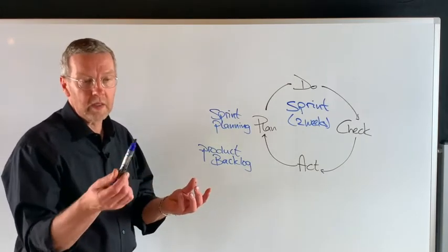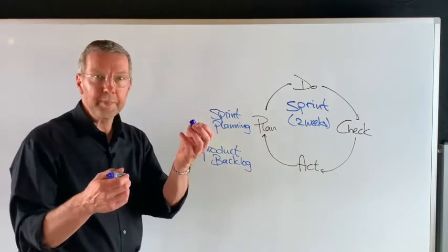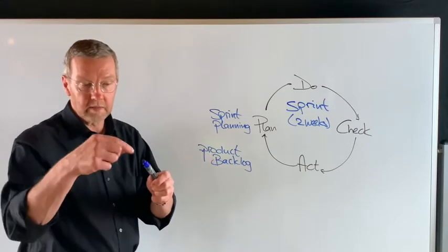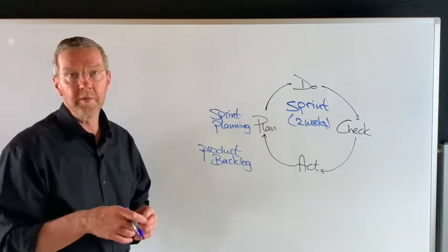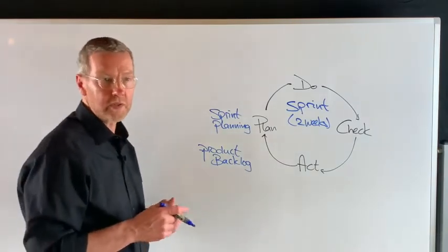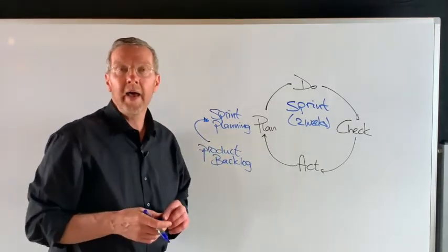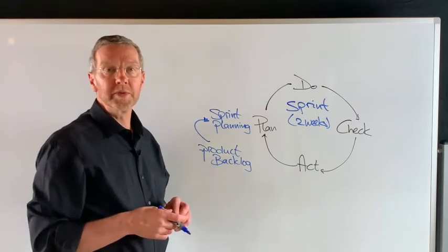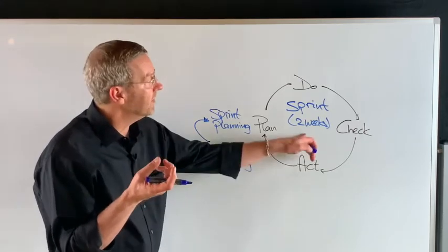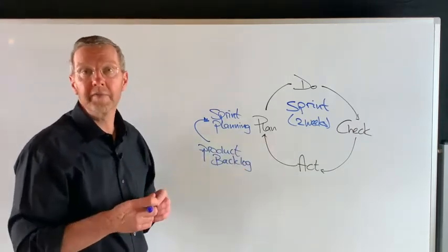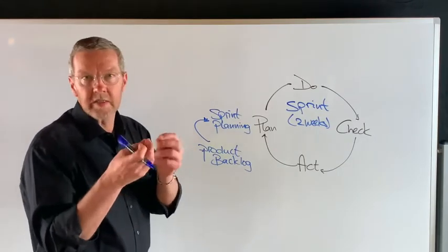If we take a whiteboard marker as a product, then delivering the cap is a product, delivering the ink, the container, the whole thing, the label, etc. All kinds of deliverables that need to be produced. So the product backlog goes into sprint planning, and the team decides what's most important to do next. And for those pieces of work, which should fit in the two weeks that they have at their disposal, detail gets written down.